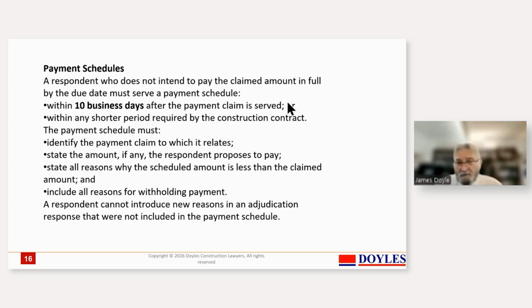The respondent can't introduce new reasons in an adjudication response which are not included in the payment schedule. That's only fair in lots of ways, and it addresses the situation that you've got to put up or pay. So that's the circumstance.